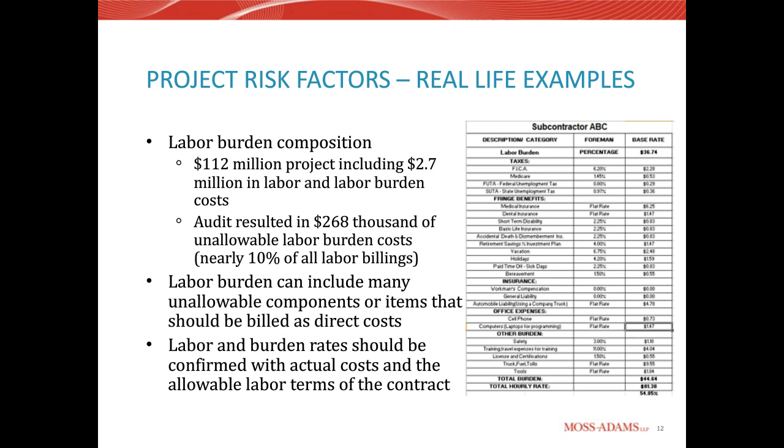You want to make sure that there's no duplication of certain items. So if you're paying computer rental costs on a monthly basis, then you shouldn't expect to see that within the labor burden rate. And that's pretty similar for any of those other expenses or other burden charges that they've included within that example rate that we provided.